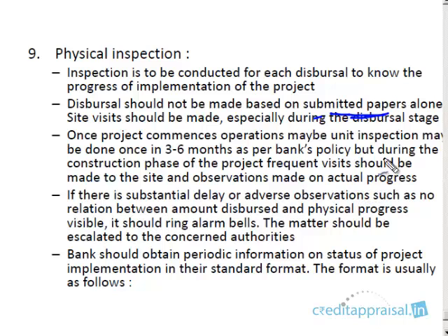Once the operations commence, maybe you can be a bit liberal, but during the implementation stage, you have to make frequent visits and ensure that the actual progress is in line with the implementation schedule envisaged. And if there is substantial delay, you have to bring it to the notice of the concerned authorities and ensure that the account doesn't become NPA, right?